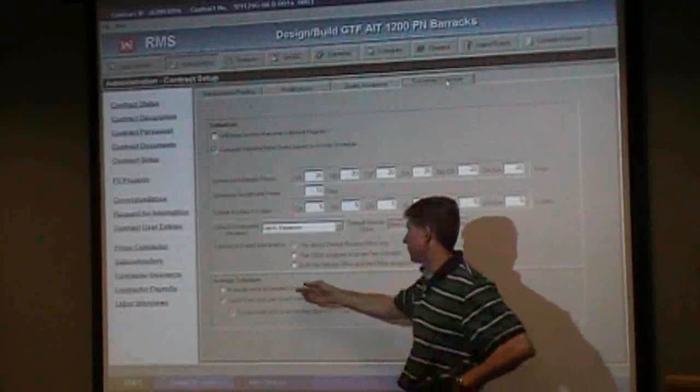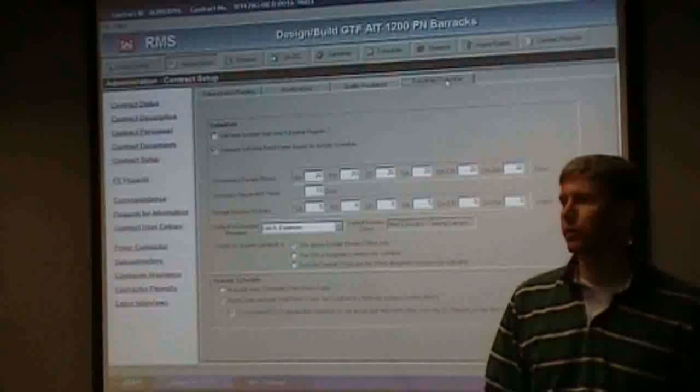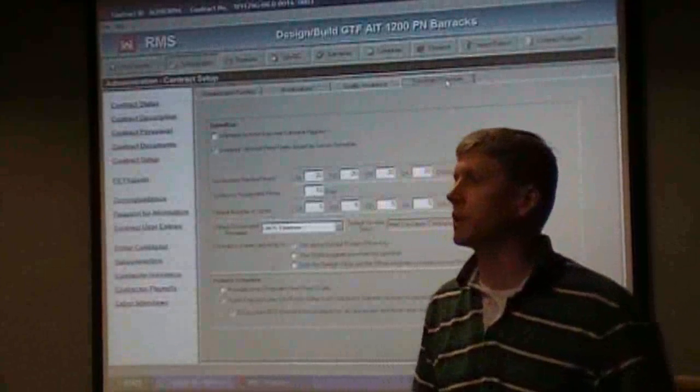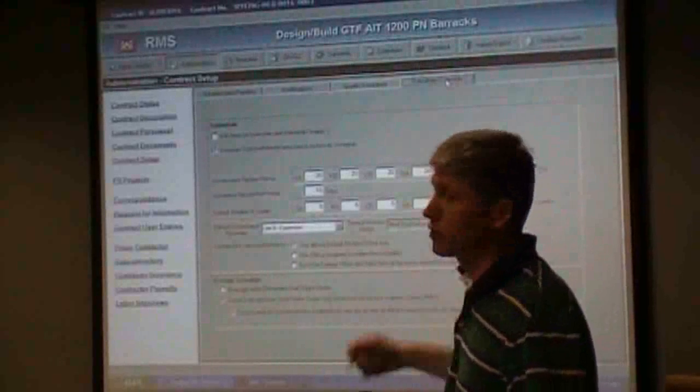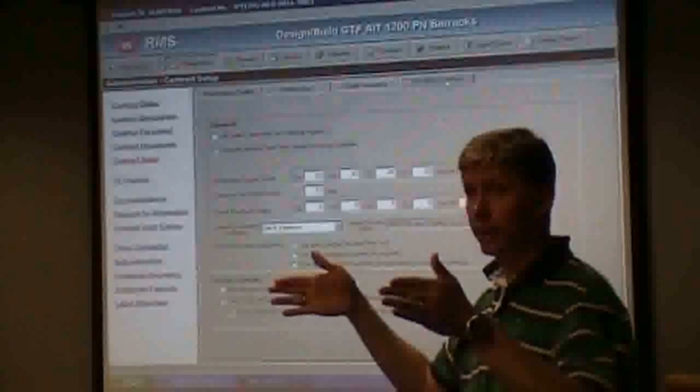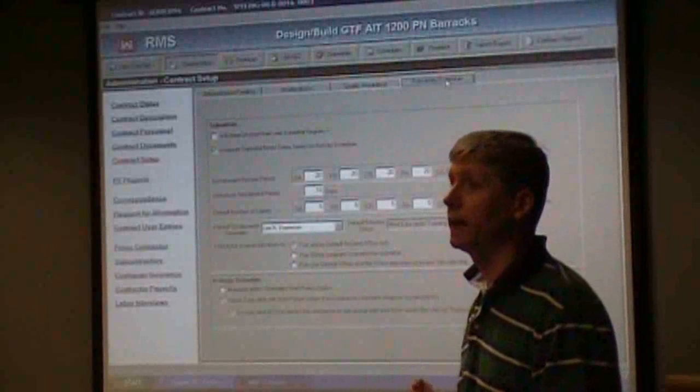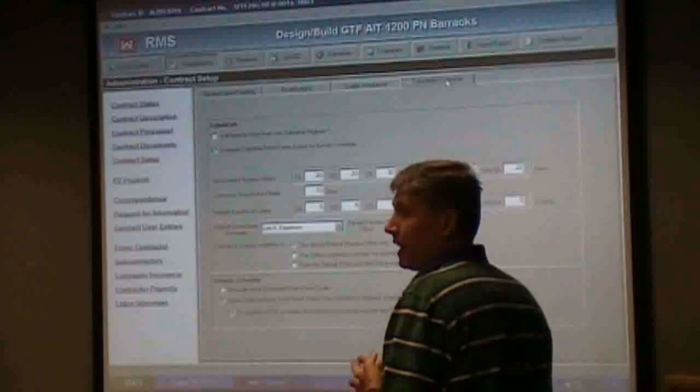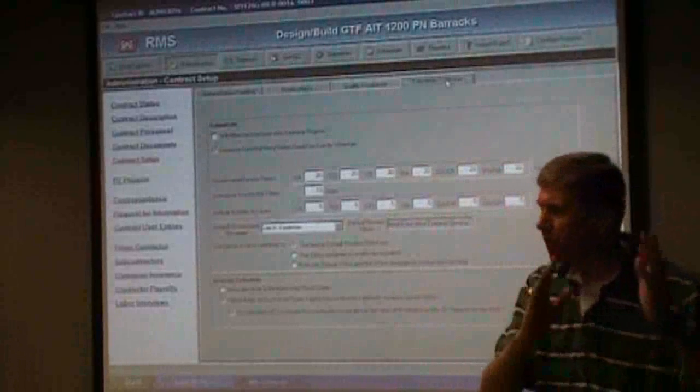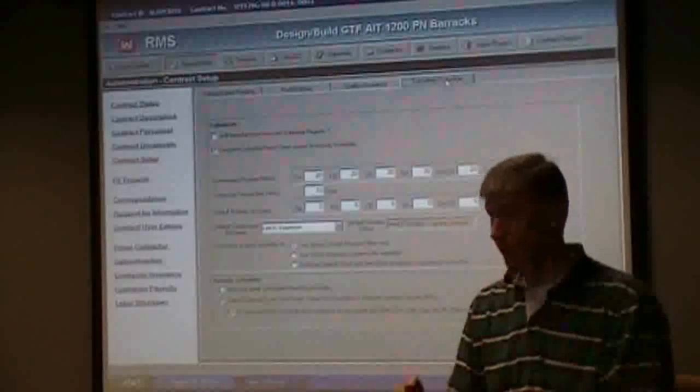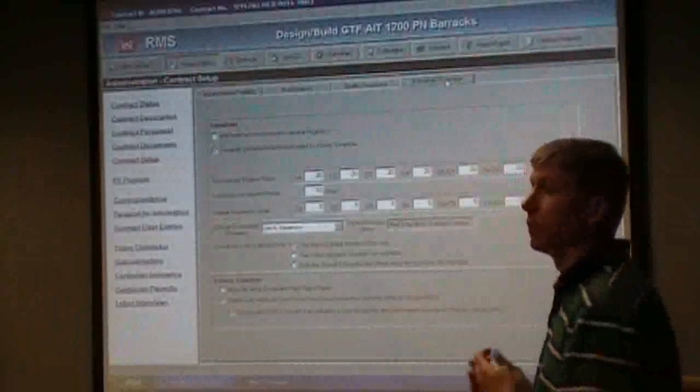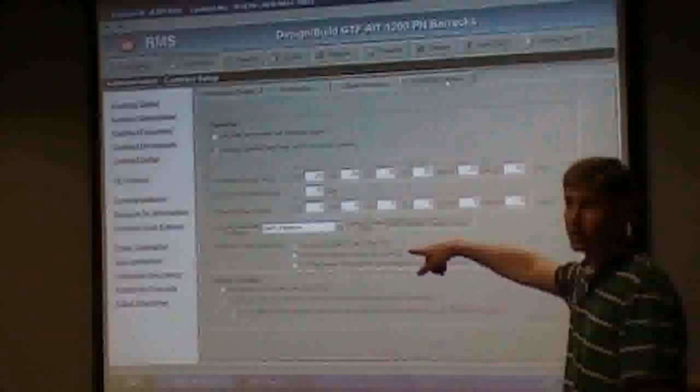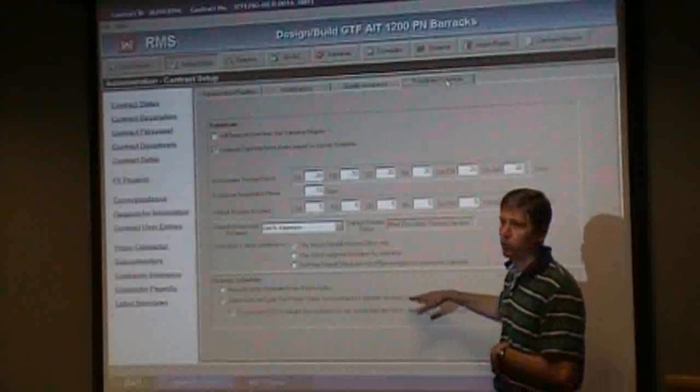Now, down here in this area, the schedule option down here, you have two options. The first one says manually enter start and finish dates. That is only for these small little jobs where you don't maybe not have a scheduling spec requirement. If it's under half a million dollars, you can actually change that switch and the contractor basically gets an Excel spreadsheet and his QCS at that point and can actually manually update that. It is a royal pain in the rear to do it that way. I've had Geico on our jobs in the past and give them a $50,000 job, a reno job, to do some little thing, and they'll build a schedule for it because it's easier to process a pay than do this manual calculation. So, but if it's not in your contract, it's not in your contract. We can't require them to do it. But you need to know you've got to switch that button if it's not in your contract, and he's not going to build a schedule. Otherwise, the system is expecting a schedule to be imported.